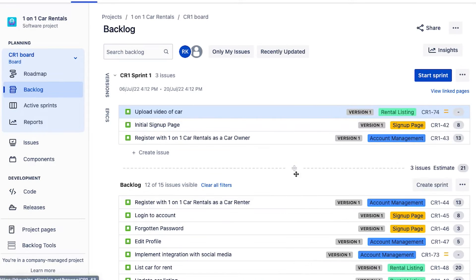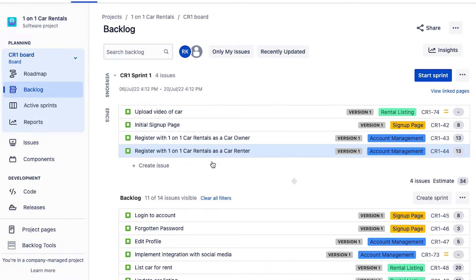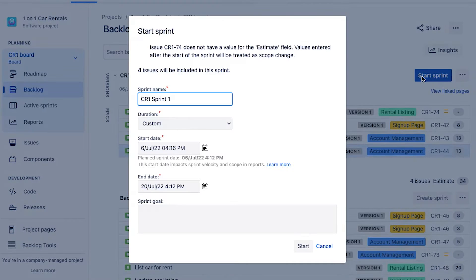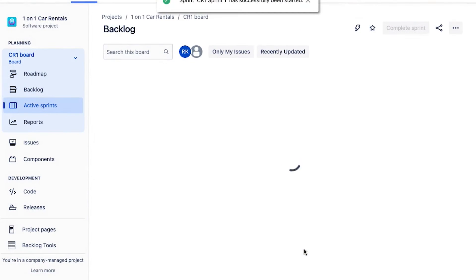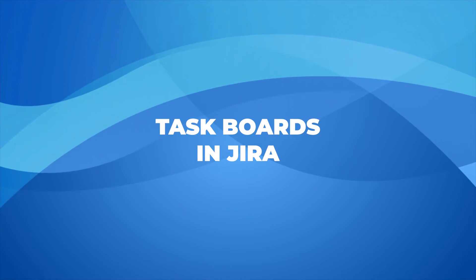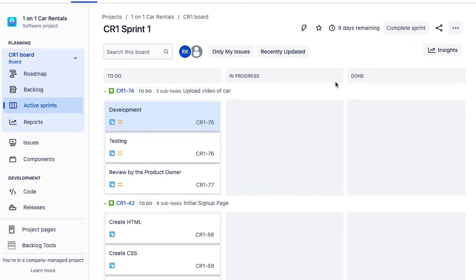The team drags in how much work they feel they can get done, and once they've reached their capacity they'll chat with the product owner. Then we start the sprint by clicking the 'Start Sprint' button and hitting start. Once the sprint kicks off, the team will need to update their sprint backlog on a daily basis so it's a true reflection of what's going on, and we want to be able to visualize that sprint backlog to see how things are progressing day by day.